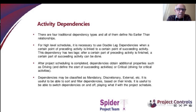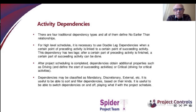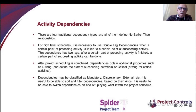This is a two-leg activity dependency — that is why we call it double-leg — and it is useful for high-level project scheduling. When a project schedule is created, activities get new properties, like whether they are driving, meaning they define the start of a succeeding activity, or critical. Activity dependencies can also have properties such as mandatory, discretionary, or external, and you can filter or sort dependencies based on these properties.